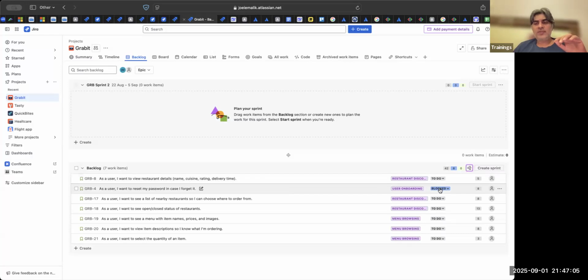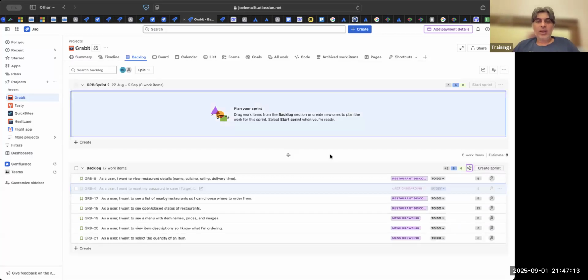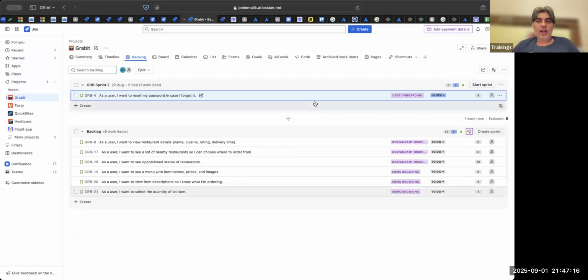So now the PO says, if that is the case, we can put it in dev again and we will pick up this story, because this is still a very important story. I am going to do it. See, we are not changing the story points of this story. This still remains an 8-pointer because this is a highly complex story, and this is the meaning of story points: it reflects the amount of effort, the amount of complexity, the amount of risk in a particular work item. It does not tell you the time it will take to complete it.